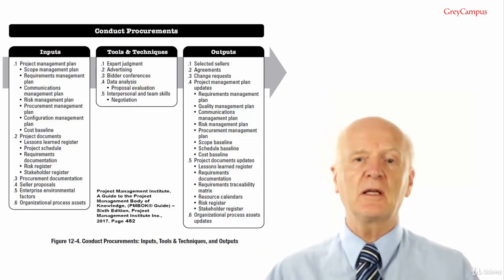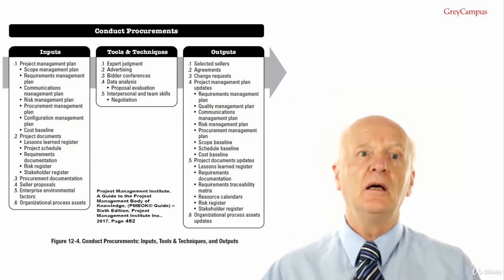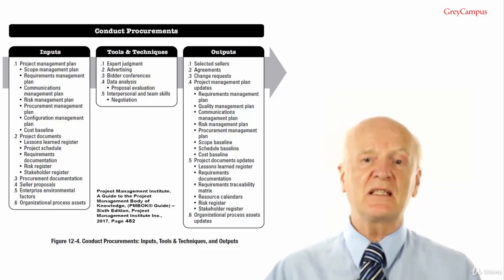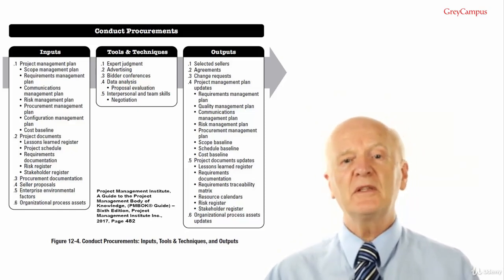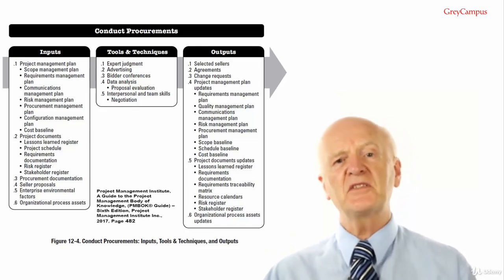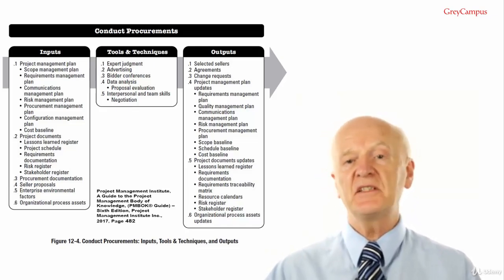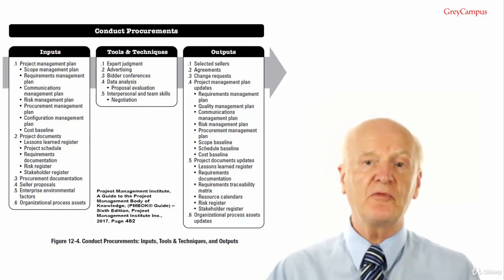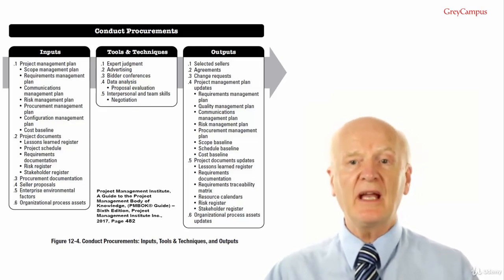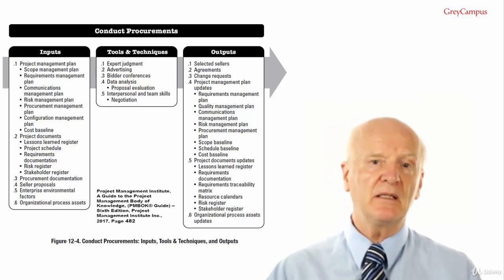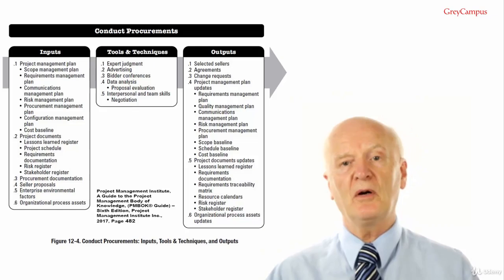But not meeting with people individually, that's the standard way it's done, but there is an exception to that. In a rare case where the bidder is in a different country and you can't use video conferencing for whatever reason, you can travel to them as long as the meeting is minuted and distributed to all parties.